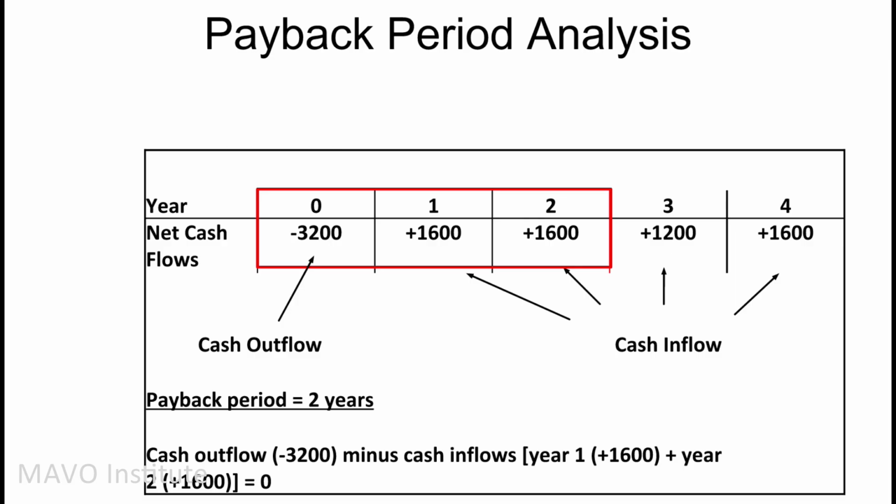Another metric you should include in the business case is payback period, the length of time required to recover the cost of an investment. The payback period of the given project is an important metric of whether to undertake a project or not. The lower a project's payback period, the more desirable it is to undertake the project.